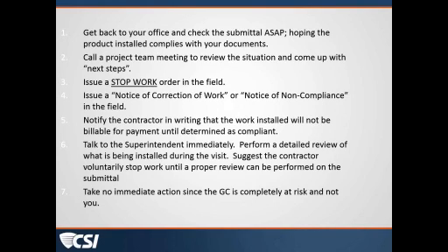Sure. We did have one more series of comments come in here from Larry Whitlock, as I guess an addendum to the 7 on the screen yet. He said he would return to the job trailer, review the A201 and the general requirements with regards to submittals, and then ask to see the "approved" submittal documents in the GC's files. Then after discussing the situation with the GC, I would return to the office to review the submittal properly.